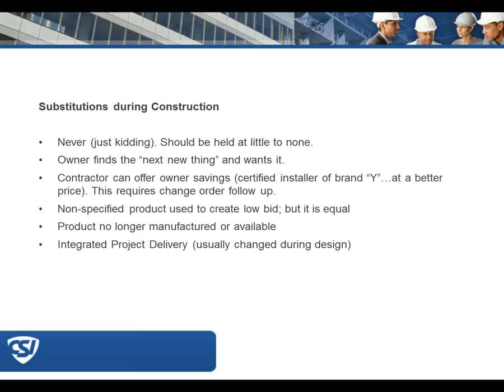But there may be an owner that has found the next new thing that they want included in their building, so you're sort of forced to take under advisement some substitutions. There may be some significant cost savings because this contractor is a certified installer of brand Y and can get it at a better price but doesn't have that same discount for brand X. If that happens, then there's a change order process to go through when money is going to be dispersed based on the current contract.